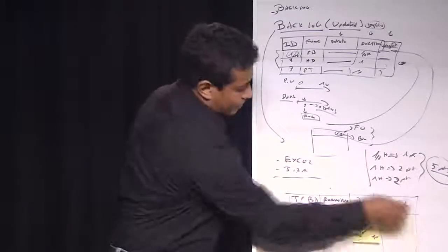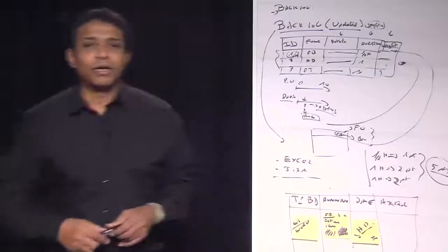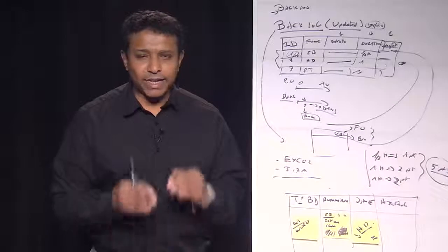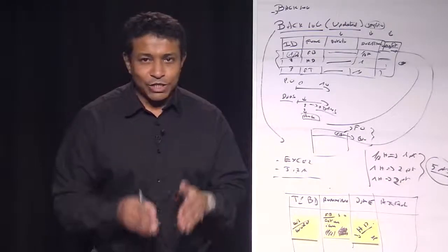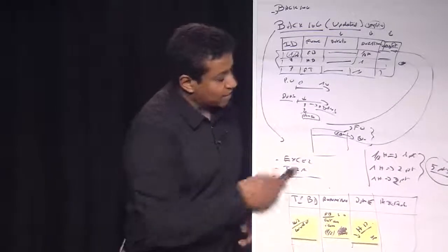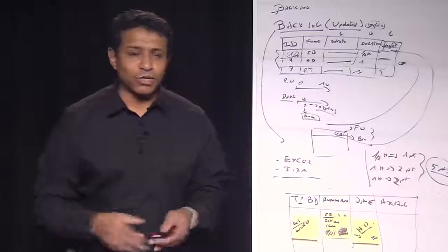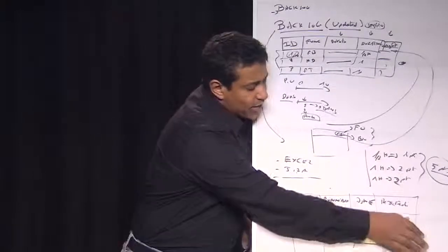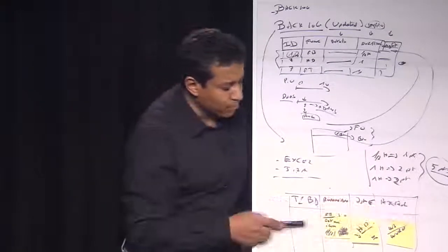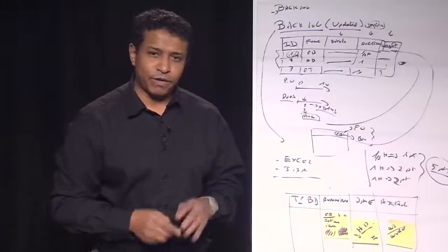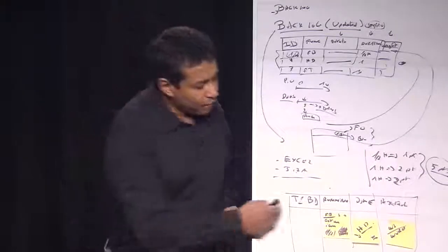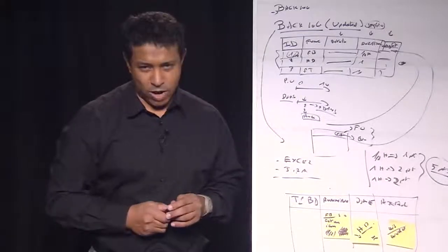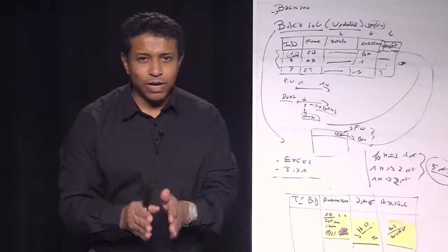Second possibility, the Scrum Master comes in the morning and says, okay, where are we? Or where's Mark? Or stuff like that. And then you realize that it won't be possible to do all the tasks in the 3 days. So what does he do? He prioritizes, and as there's no point here, he puts it in rejected so that he can put it back on the next sprint. It's important to understand that this way of managing your project is the best way to know exactly where you stand.